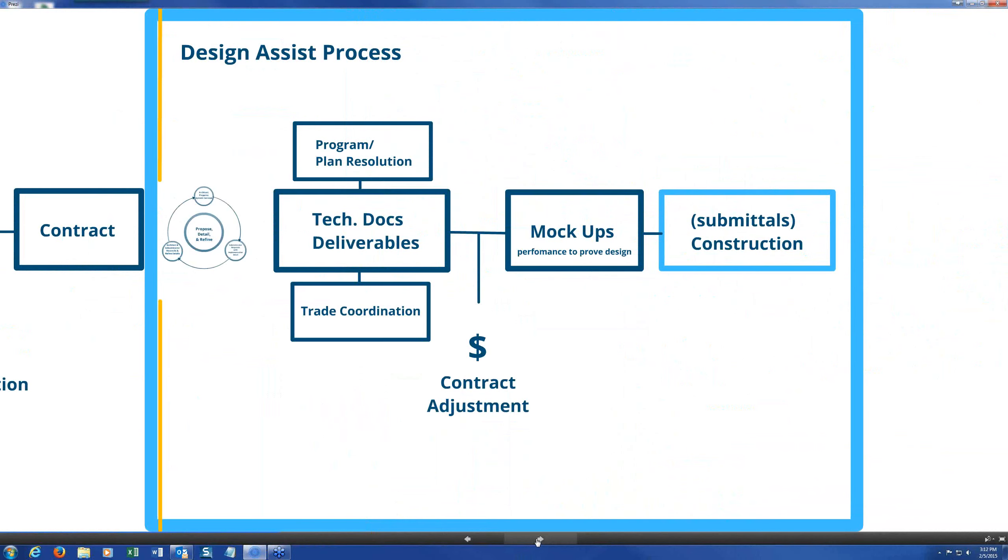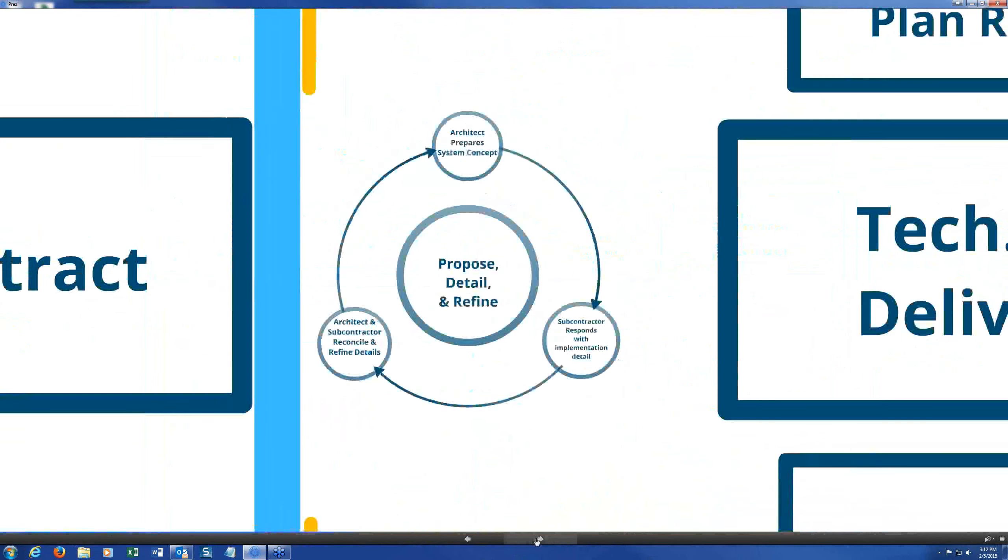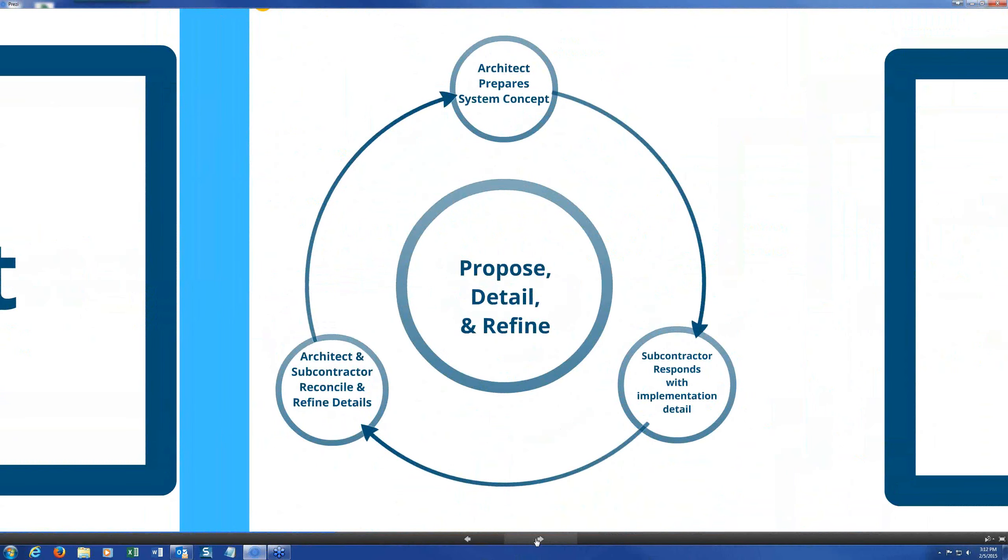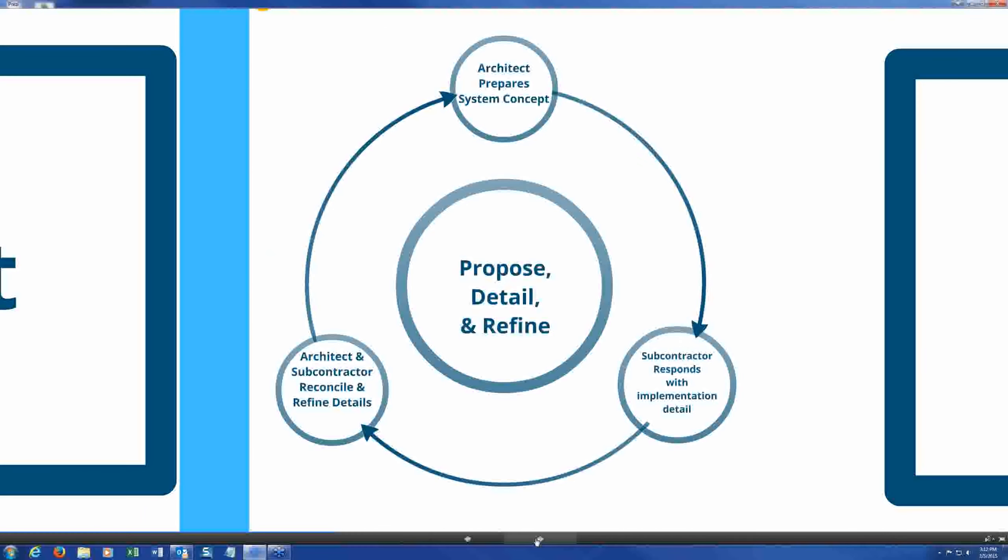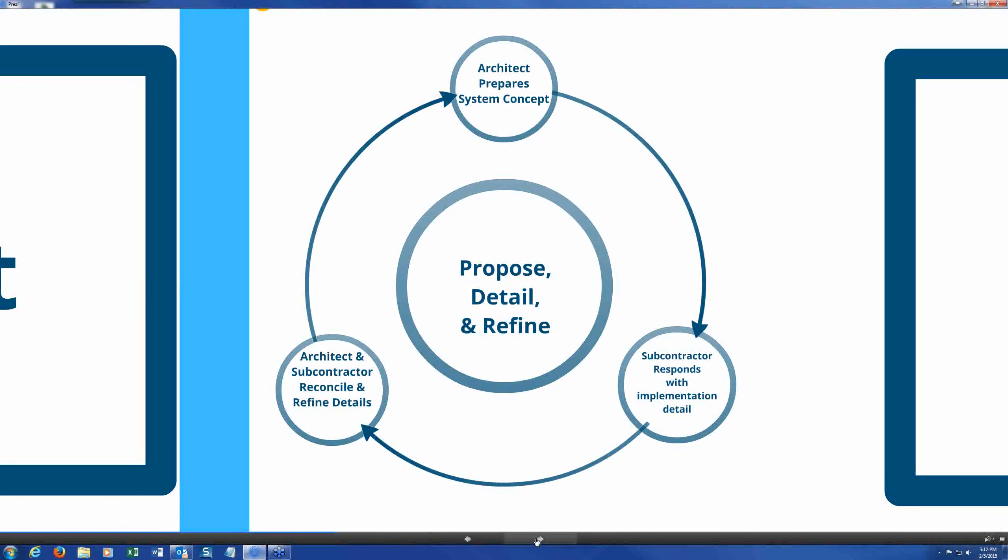Then once it goes through that RFP process, the subcontractor, the trade contractor, may be selected. They're going to negotiate a contract before they actually start providing services. Once the contract is signed, then they'll move into the design assist process. But this is very common for integrated project delivery method of project delivery. And in some cases, I think once or twice, we've actually had a representative from like the curtain wall contractor come to our office and set up shop on a spare works table.